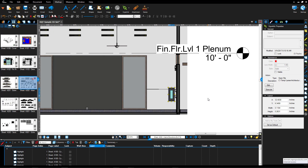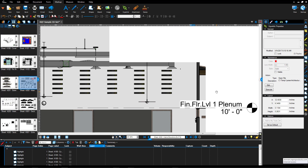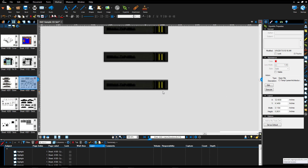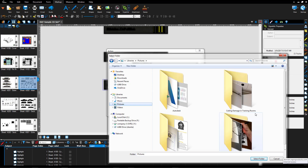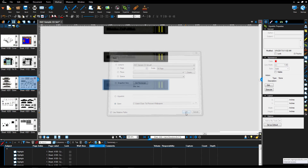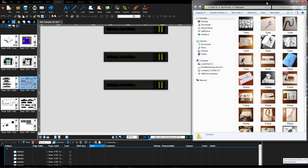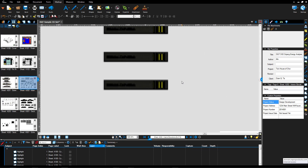Another way you can create a hyperlink is instead of linking to a file or product page, you can tell it to go to a specific subfolder. For example, I want to create a hyperlink of this area so it goes to a folder that has pictures or similar content. I use the hyperlink command, create the rectangular region, tell it to open a folder, and tell it to go where I want it to go. If I click this link, it should open up Windows Explorer directly to that folder. This is a good example for RFIs or addendums — instead of jumping to a particular RFI, you take the user to the master subfolder where all of them are listed, so they know which is oldest and which is newest.